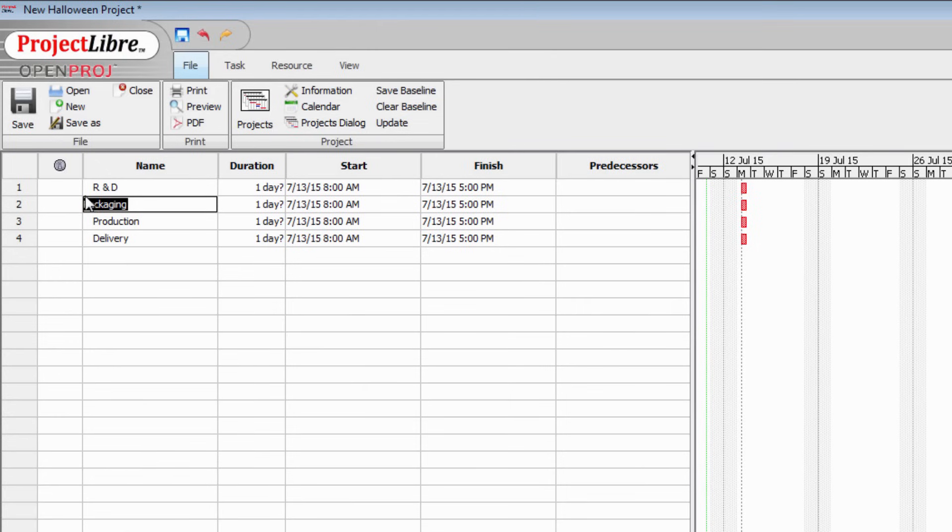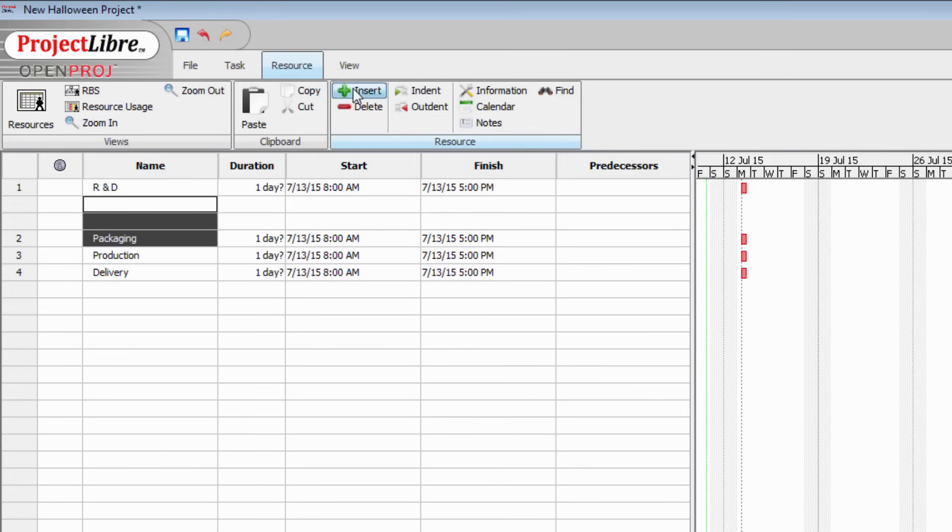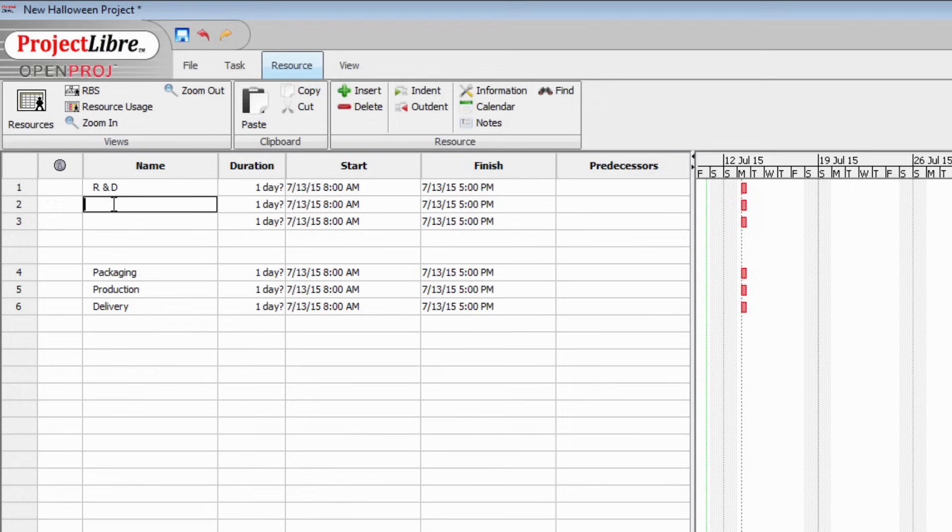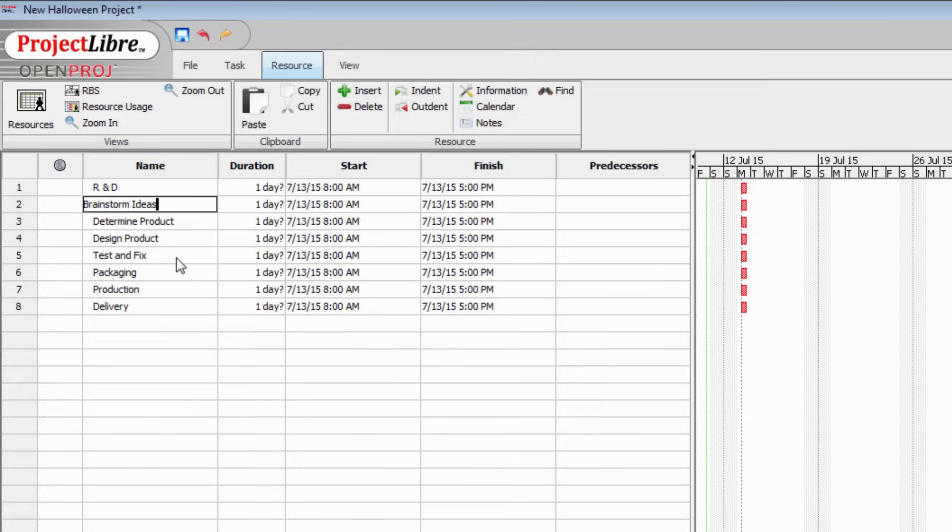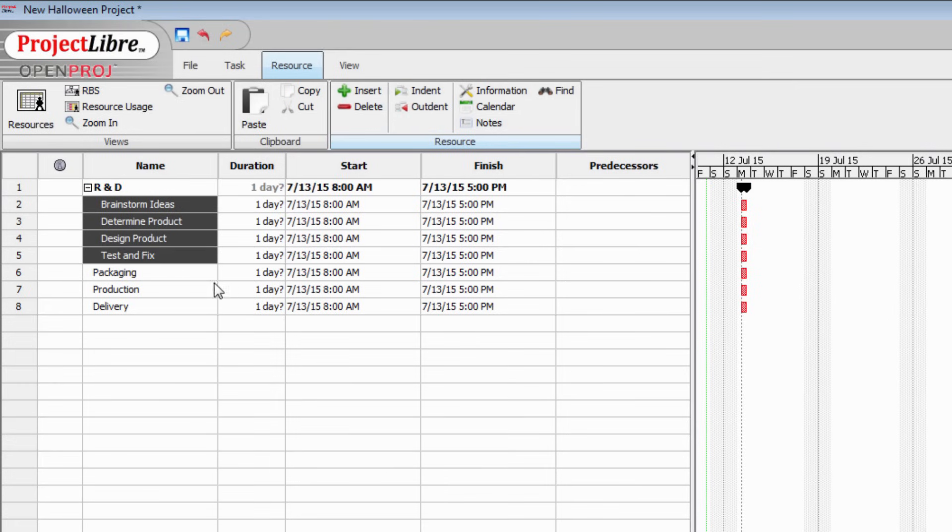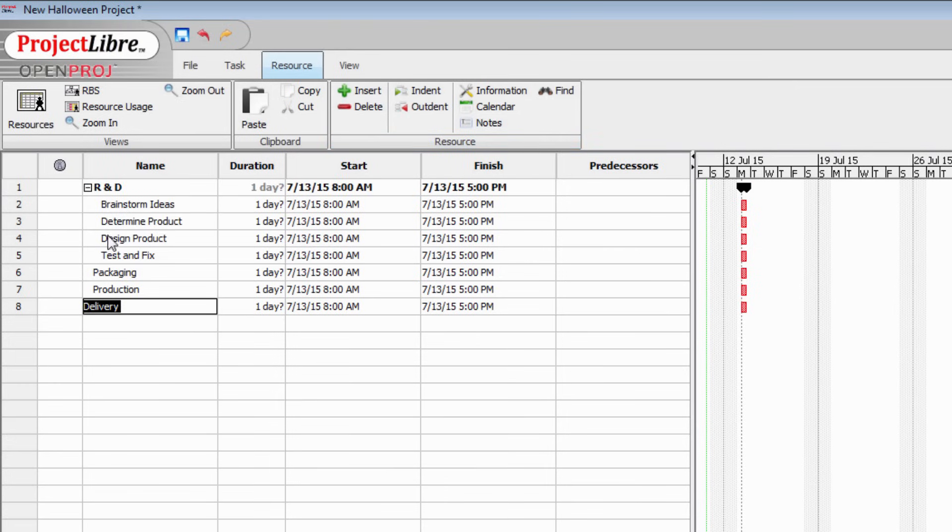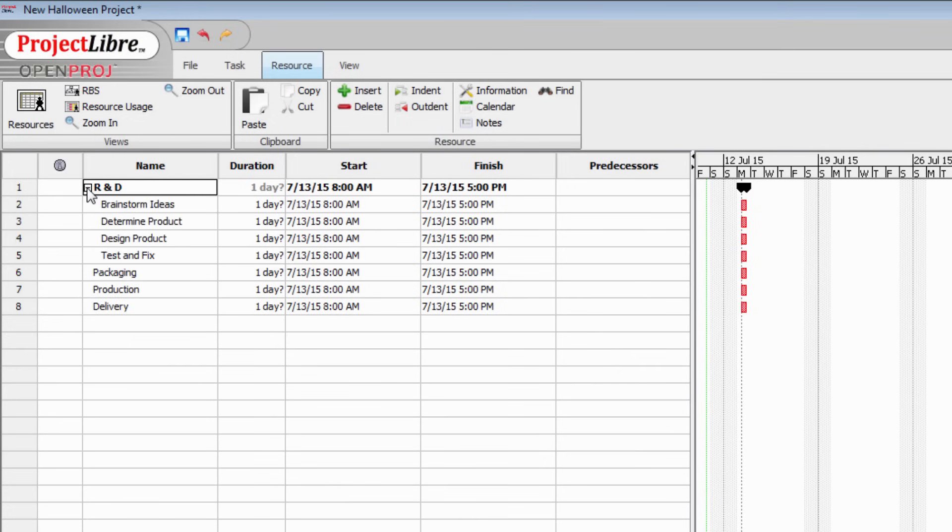We're going to add those now. We'll click in the row immediately below the research and development task and the easiest way to add subtasks is to go to the resource panel here and click insert. I'm going to add brainstorming ideas, determining the product, designing the product and testing and fixing. These four items all fall underneath the title of research and development so we're going to indent them. I'm clicking on one, shift clicking on the last in the series and I'll click indent. Now that does a couple of things. Not only does it indent these items but it also makes research and development bold. That's now a major heading. We can collapse these items and expand them and there's a black bar here for research and development.